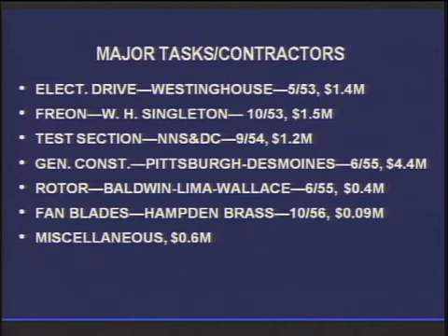When this job was put on hold, the technical services just couldn't let the engineers sit there on their hands, so they had to put the people on the other job. So when it looked like the job was going to be revived, they just couldn't go out and grab these people and put them back in. So they had to focus on what they thought was most important. They focused on the general construction contract, and they didn't put much emphasis on the test section. So they petitioned NASA NAC at headquarters to let them award a sole source contract to the Newport Shipbuilding and Dry Dock Company for the design and fabrication of the test section.